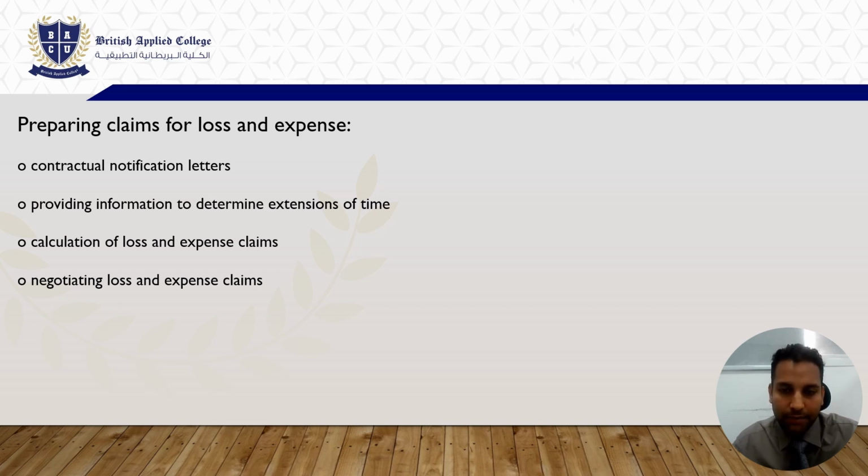But what happened in the construction industry is that the projects which were taken during or before that, which were supposed to be completed in maybe 1 or 2 years, got delayed, due to which the funds needed to be adjusted. So if there is a certain amount of loss, you can talk to your client and tell them you have incurred a certain amount of loss, and you are expecting some or all of those losses, or at least some of it, to be paid by the client. You need to take care of that as a quantity surveyor.